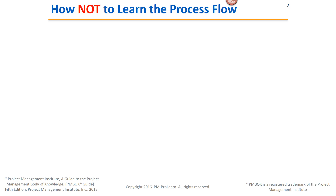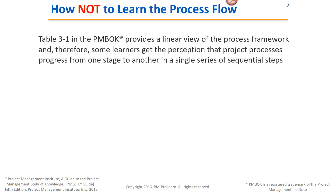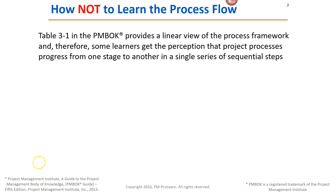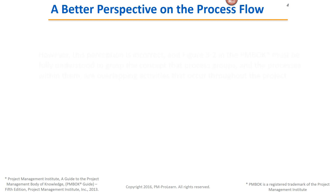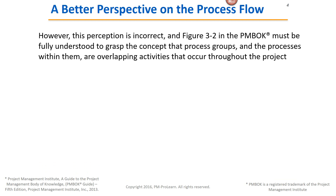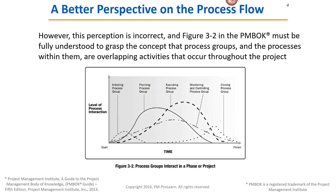So let's talk first of all about how not to learn the process flow. Table 3, TAC 1 in the PMBOK Guide is a great chart, but it provides a very linear view of the process framework, and therefore some learners get the perception that project process has progressed from one stage to another in a single series of sequential steps. However, this perception is incorrect, and Figure 3-2 in the PMBOK must be fully understood to grasp the concept that process groups and the processes within them are overlapping activities that occur all throughout the project.